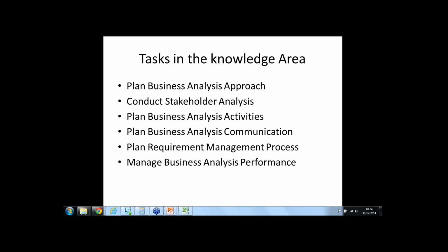And also I'll ask you to categorize these dependencies into various categories. You can classify your dependencies on a scale of 1 to 5, 1 being the lowest priority and 5 being the most critical component. So you can prioritize your dependencies in this way. First you have to identify the dependencies, and then you have to prioritize them.